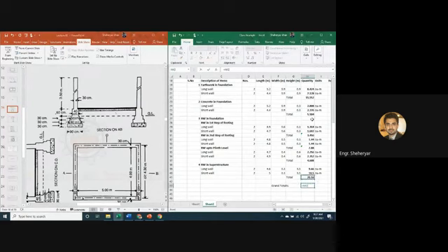It will be this brickwork in superstructure plus brickwork up to plinth level plus brickwork quantity in the second step of footing plus brickwork quantity in the first step of footing.